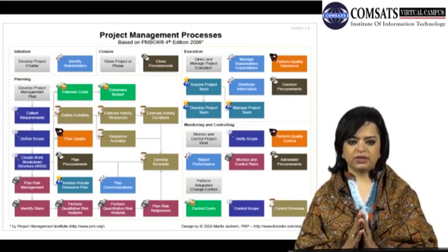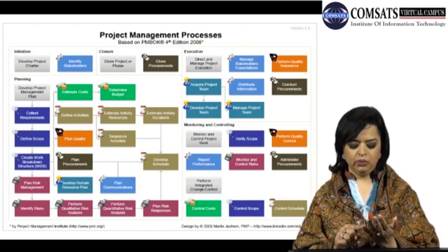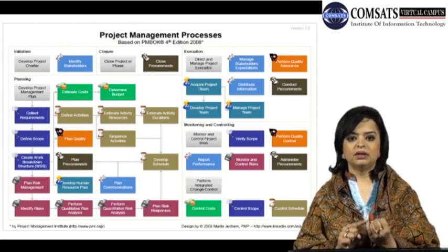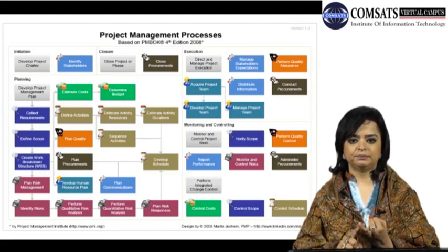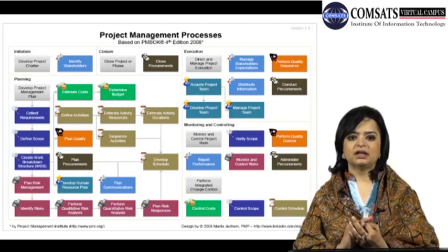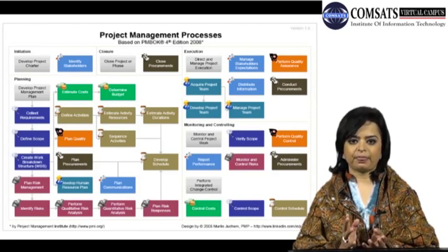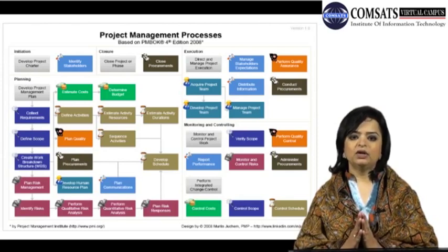When we use the word scope statement, we need to ensure that we are focusing on tangible data, focusing on data that can be measured, tangible data. Stay clear from adjectives, stay clear from words that can have dual meanings. So, having done all that, the next resulting document would be your scope management plan.